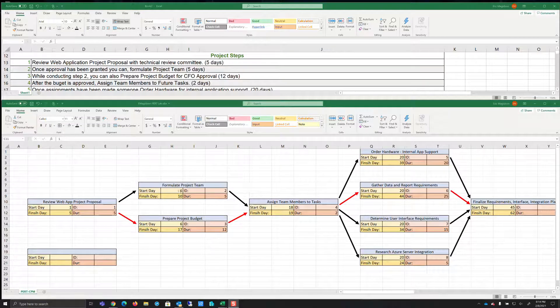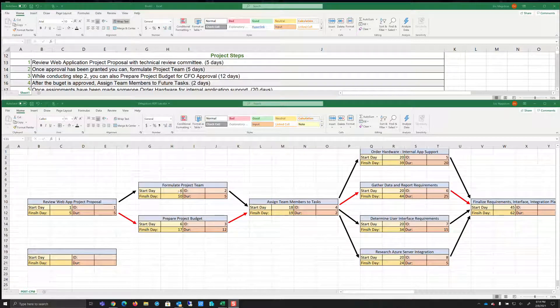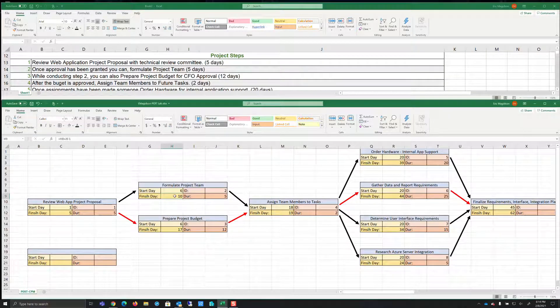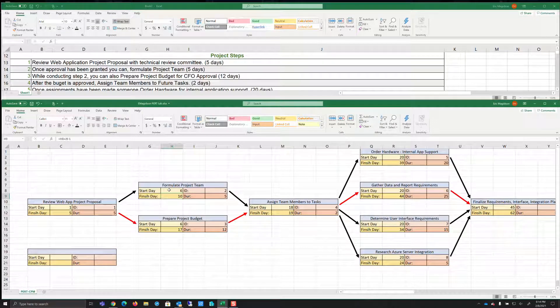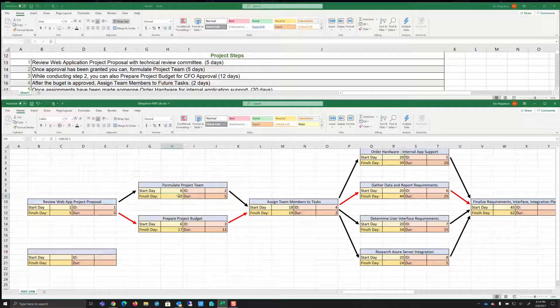So notice what I'm doing here. I'm basically doing some math. If you notice here, that's taking my start day plus the number of days minus one day. So it's going to be 10 days. Again, if you do this with your fingers, starting with day six and you count six, seven, eight, nine, 10, you actually find that you've worked five days finishing on the 10th day.